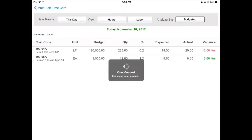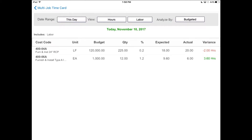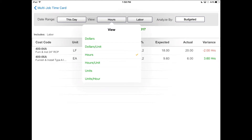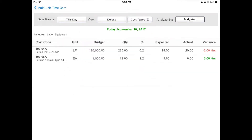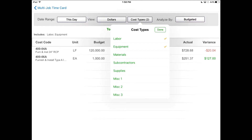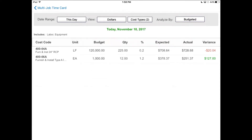Now you can see how this job is doing based on labor hours against your budget. You can customize your view by choosing dollars, hours, units, and you can also choose which kinds of cost types you want to include, whether that's labor, equipment, materials, or subcontractors.